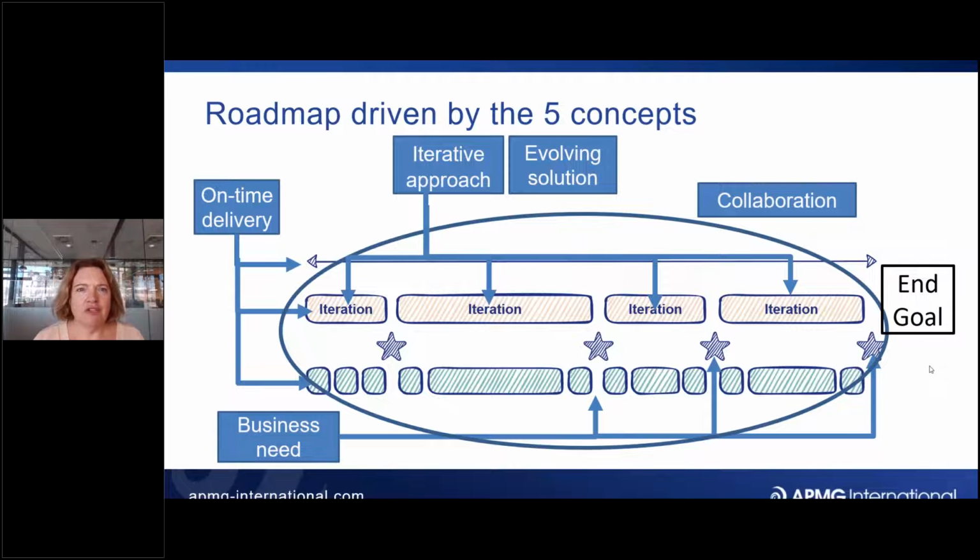So a lot of what I'm doing is making sure that I partner what we might call tangible change. So I'm building a platform along with all of the procedures, the processes, the pricing, the marketing context, the training up of customer services staff, so that even if I deliver just one of the services at the end of an iteration, it is deliverable to customers.